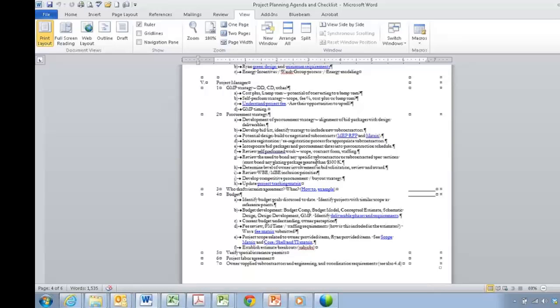Self-performing is definitely not something we see a lot in Arizona, but it is definitely a factor in this effort that needs to be taken into consideration as it relates to our overall fee and how it will be administered. Is it going to be administered as straight detailed cost, or will it be in a lump sum fashion as we would administer a subcontract for that work?